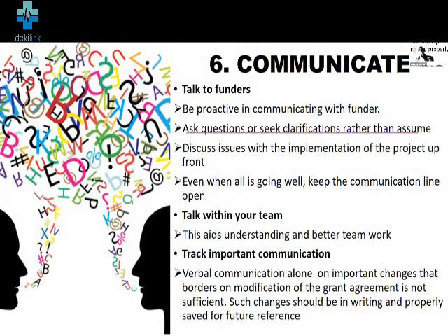You must also talk within your team. Of course, if you're going to have an effective team, then that team must be communicating amongst themselves. Now, it's so important that if you're communicating within the team or with the funders, and you have to make a change, and that change borders on changing something in the agreement, that communication must not be verbal alone.